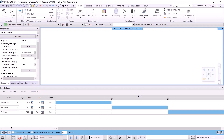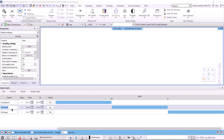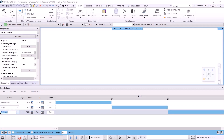I will rename them and create a new row to get: foundation, walls — including exterior walls and interior walls — and finally a roof, which for simplicity will be a flat roof and will be created with a slab. To rename them, I simply click on the name and choose the corresponding name from the list, or type in the new name. Let's rename this one to Walls and this one to Roof.